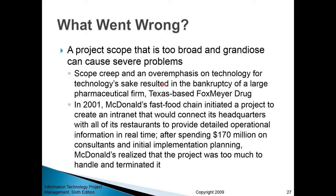FoxMeyer was trying to implement an ERP system — I believe it was SAP — but the project was so large they were trying to revamp the entire organization, putting every process on the rails of the new ERP system. It turned out to be so complex: the scope was enormous, requiring massive resources and creating huge disruption to existing processes. The entire company went bankrupt, and they sued their consultant — I think it was Arthur Andersen — for half a billion dollars, blaming them for the bankruptcy.